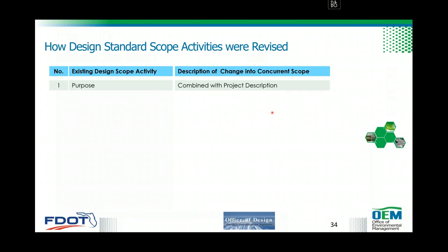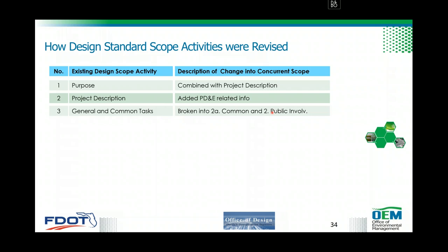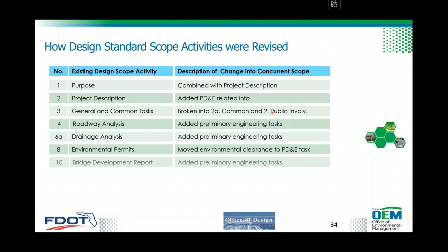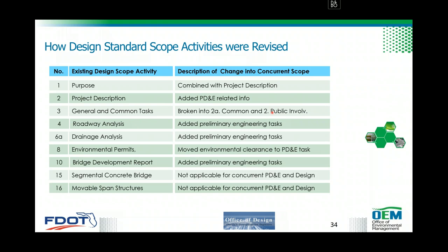This slide shows how PD&E activities were revised. On the left is the existing standalone PD&E scope of services; on the right is how those activities are scoped under the concurrent PD&E and design phase. Sections 1 and 2 of PD&E (scope of services and purpose/project description) were merged into one 'Purpose and Project Description.' Public involvement was merged into the new public involvement section (2B). Engineering analysis moved into: 3A (preliminary engineering analysis), Section 4 (roadway analysis), 6A (drainage), Section 7 (utilities and railroads), and Section 10 (bridge development report). Environmental analysis and report became 3B; the environmental document became 3C. Noise analysis was merged into Section 32.